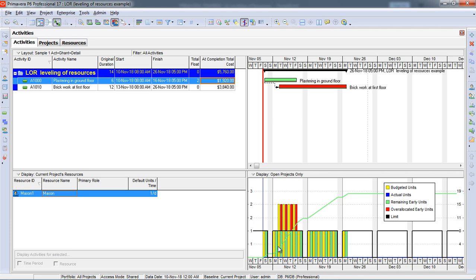Another thing: this curve is basically the S curve of the resource. The S curve is mostly used in Primavera. It is the cumulative of resources, or in the cost profiles you can see the accumulated cost profile. This is a very good thing for understanding how resources are working.